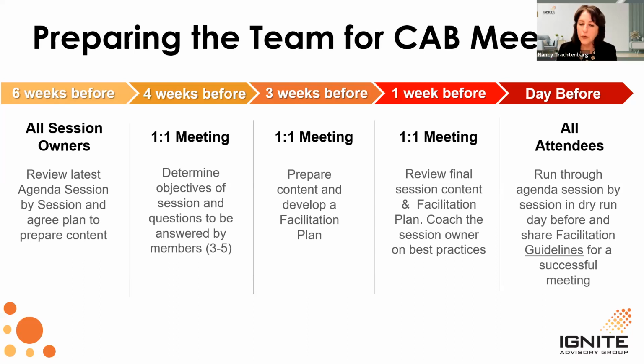About 2 weeks later, 3 to 4 weeks before the meeting, we come back and do a second content review with everyone. At this point, the session owner's content should be about 90% finalized. And then we may have a meeting like the week before to finalize everything, and then you have your on-site dry run. That is the day before the meeting, on site, with everyone from the host company who will be at the meeting.